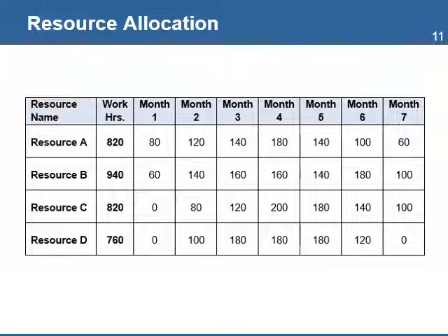The chart shows an example of the use of resources in the project and how some resources are overallocated. The typical amount of work a person is assigned to a project in a month is 160 hours, at 8 hours a day. If your schedule is showing that some team members have been assigned more than 160 hours per month, you will need to review the work assignments.